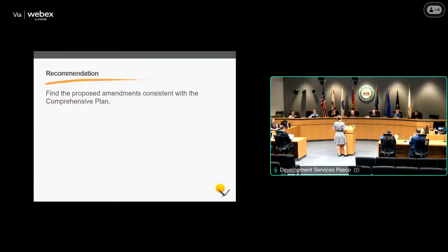Fee for payment in lieu. I think the plan right now is to have the developer provide a cost estimate. That cost estimate would then be reviewed by the county attorney, who would give it a stamp of approval. Not the county attorney. Or I'm sorry, county engineer. The county engineer would review it. He would get a stamp of approval, and then that would be the cost that we would use. And we like that method because it can accommodate different widths and construction materials that might have otherwise been required by the code.